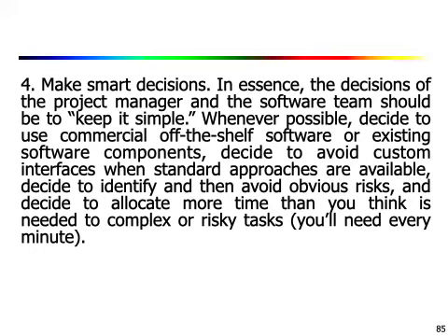Then the fourth part is making smart decisions. In the sense, the decisions of the project manager and the software team should be to keep it simple, that is, whenever possible, decide to use commercial off-the-shelf software or existing software components. Decide to avoid custom interfaces when standard approaches are available. Decide to identify and then avoid obvious risks, and decide to allocate more time than you think is needed for complex or risky tasks, etc. Okay, that's how you can make smart decisions.